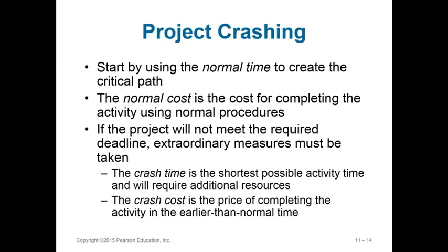So if you were able to collapse B or D or F a little bit, you might find that a new critical path actually emerges out there. Or if you can crash something on the critical path, then you might find that B and D and F now become on the critical path. Sorry about that.